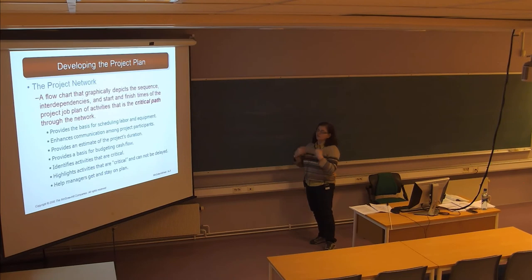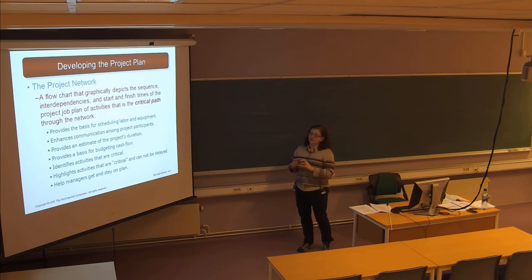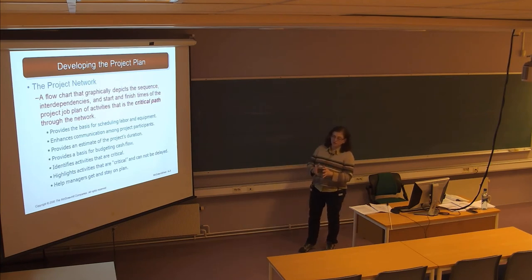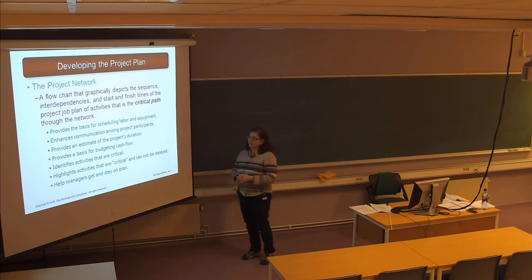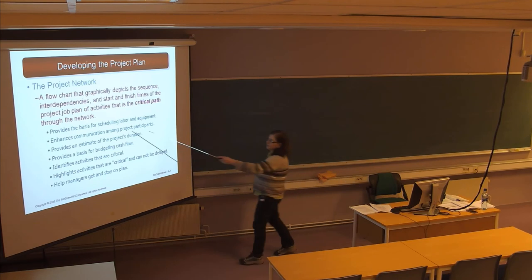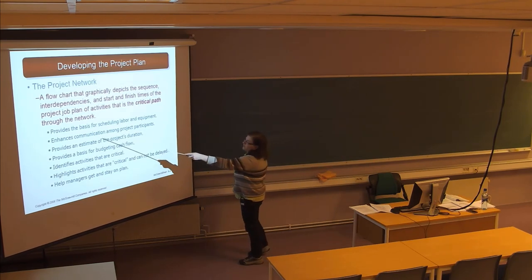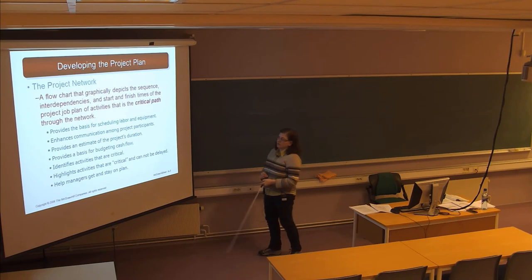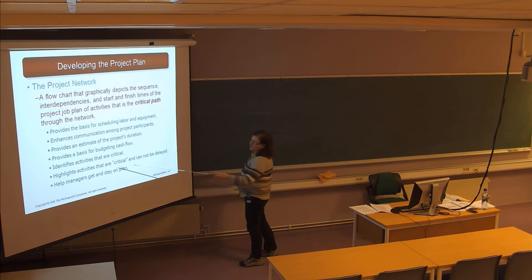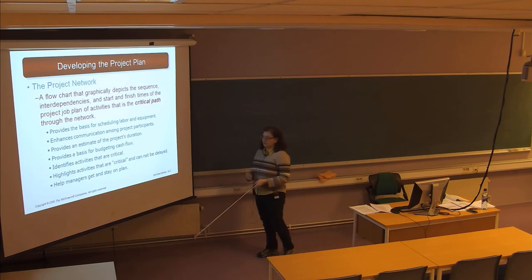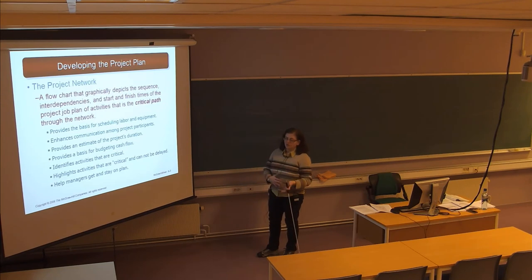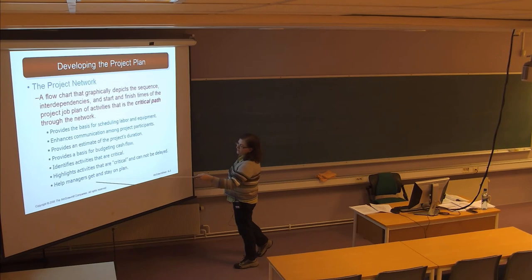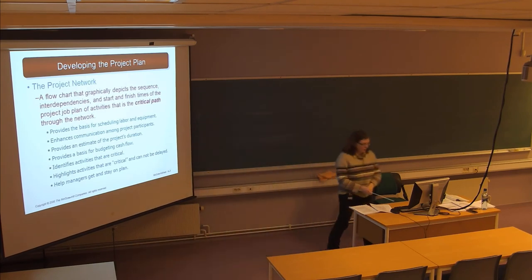This is a visualization of the flow of activities, and it allows the project manager to be very clear about when is the earliest starting time for a certain activity and when is the latest starting time. It allows them to schedule labor and equipment, communicate with everyone involved in the project, estimate the duration of time for the entire project, use it as a basis for budgeting, identify what the critical activities are, and determine what cannot be delayed without delaying the whole project completion time. It's used to stay on target and keep up with the current plan.